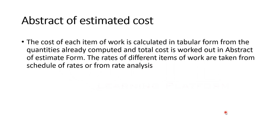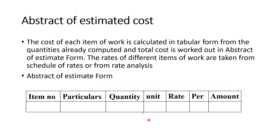The quantity from the measurement table is used in the abstract estimate. Here you enter the quantity, apply the rate, and multiply to get the amount. Different items such as excavation, CC bed, roof, column, and wall are each considered separately. All amounts are added together. At the end, three to five percent is added as contingency for unforeseen expenditure, and two percent is added to meet work charges establishment as contractor profit.